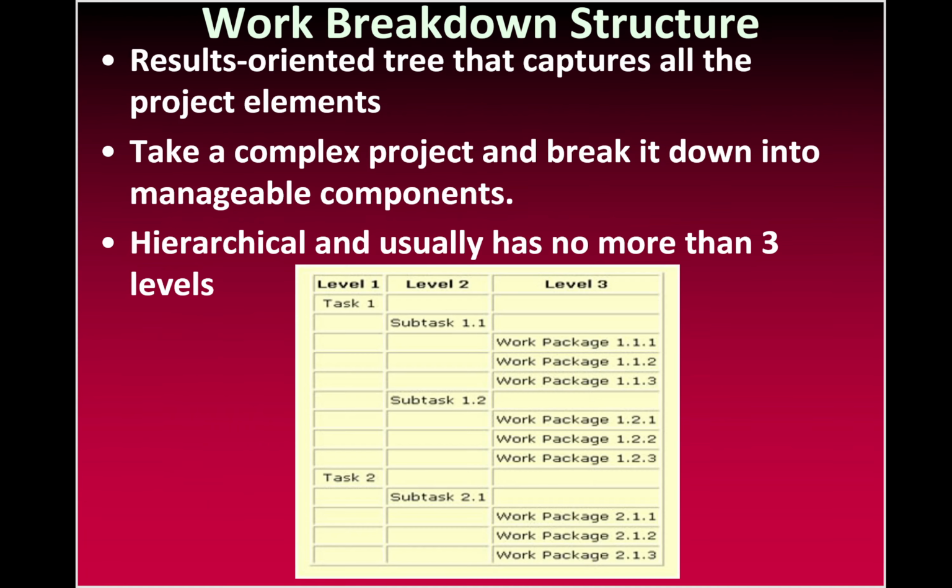The first thing you do with this is what we call a work breakdown structure, where you break the huge project up into much more manageable tasks. You can do this in varying levels, as we have here. If you're designing an automobile, you may have an engine group, and within that engine group, you break that into specific ideas that you're looking into.